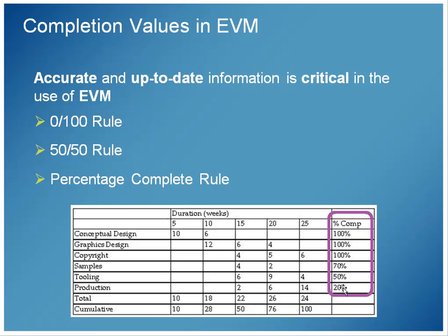If your schedule is at a very, very short window of opportunity, like 2 days max, then you could use the 0-100 rule. Saying we're 50% complete on a project that I'm going to be done with at 5 p.m. today, I don't need that level of granularity. But if it's something that's going to take a week, and I've spent 4 days out of 5, but it still shows up as 0 because I'm not complete yet, then the 0-100 rule wouldn't work very well.